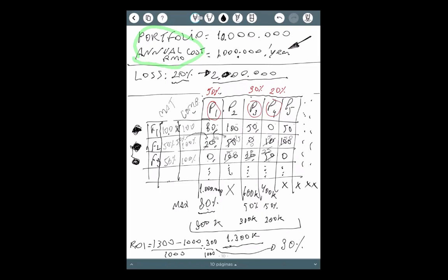And it makes sense because if you are providing the function without maturity and without competence, I'm sorry, it will not be 50%, it will be only 25. So this number here is not 50 anymore. This number here now is 25. So it's not 200,000, it's only 100. And now my return will be only 1,200,000.